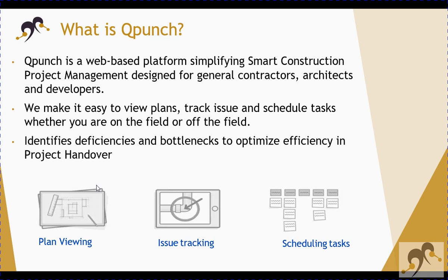A punch is basically in the final handover stage, where the contractor is trying to hand off the site to the final tenant, and the inspectors and quality assurance people are coming and inspecting the site, ensuring that there are no leftovers or pending work which was defined or planned as part of the specifications and drawings, and was committed by the contractor.